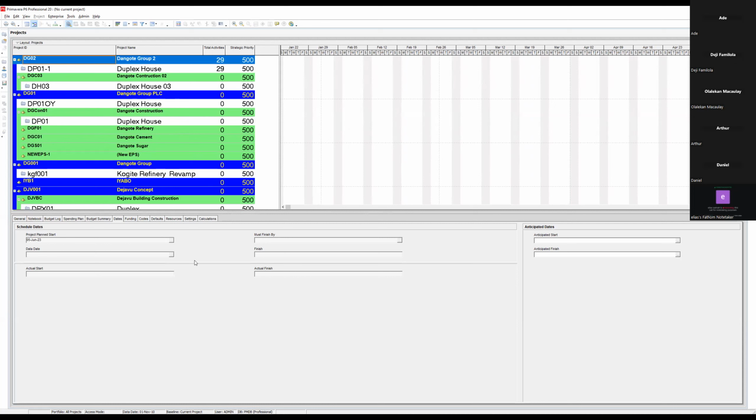To create these nodes, we go to one of the tabs at the top, which is called Enterprise. On your PCs, when I tell you to click, please click so that you can do it as I am doing it just now, right? So to create a node, or to create the enterprise project structure, EPS, go to Enterprise at the top.